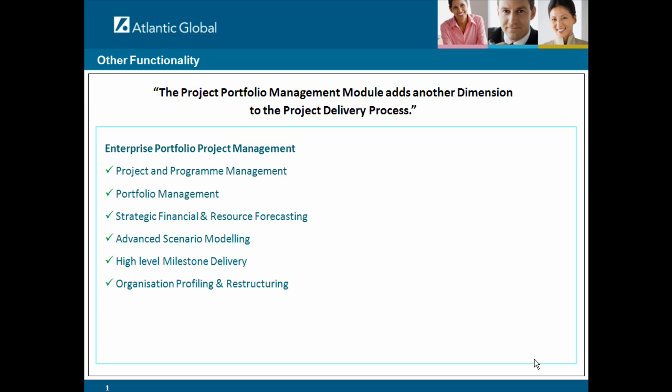You can define a high-level forecast at any level in the hierarchy to outline the resources and budgets required to complete a project or a program. You can create permissions to let a user baseline or delete project forecasts. You can also create PMO milestones at any level in the hierarchy.